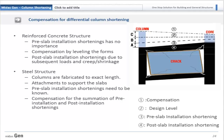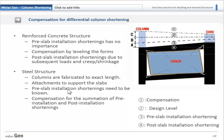In RC structures, pre-slab installation shortening has no importance because compensation is already done by leveling the formwork. After the slab has been cast and loads come onto the slab, post-slab installation shortening — due to subsequent loads and creep and shrinkage — comes into picture, and this is used for compensation to reach the design level. In steel structures, columns are fabricated to exact length and the pre-slab installation shortening is required to be known. Total compensation will be pre-slab plus post-slab installation shortening.